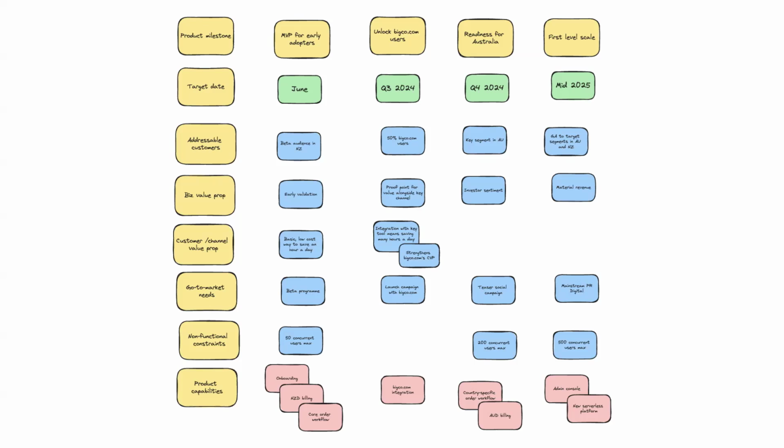So we've got a weekly planning cadence around this board. During the week, we're coming up with proposals to change it. We get some new information, a new deal comes along, whatever it is. We propose that, and then as a cross-functional group, we all agree what the change is going to be. And then every couple of weeks, at the all hands, we play back what's changed, like a diff, to the whole team.